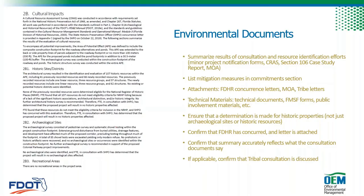The cultural resources requirements for environmental documents are straightforward and similar to those for other resource issues. You'll summarize the results of consultation and resource identification efforts in the cultural section of the document, including your determination such as 'no historic properties affected.' You'll discuss consultation with DHR or SHIPO and list any commitments made to minimize or mitigate adverse effects to historic properties. CRASSes, effects evaluations, and other technical documents should be referenced in the environmental document but not attached — those live in the project file. However, concurrence letters from SHIPO/DHR and any correspondence with tribes should be discussed in the summary and attached to your environmental document.